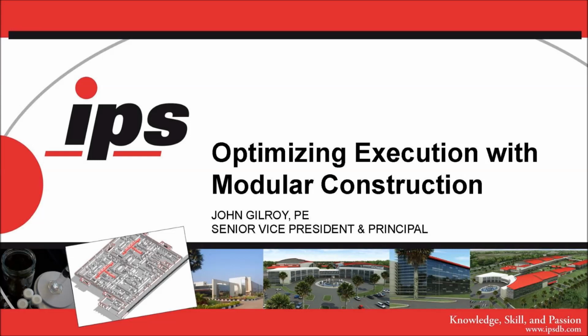Systems experience in locations that don't have that expertise. That's another reason to choose modular. If you were in a remote part of the country or the remote part of the world, you could get the quality people with the experience of doing those types of finishes and systems and bring those modular constructed pieces into the facilities that are at remote locations.